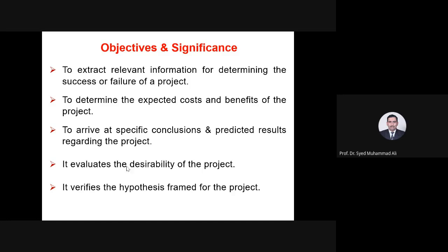Another thing which is being considered now, apart from climate change, is also the physically challenged people, disabled people. Are they being considered inclusive in the development project? That has also become part of the appraisal now. Are the women given emphasis in terms of utilization, for example? Just as an example, there is a road which you are planning between Mardan and Charsada. For example, it takes a 1 hour drive. Are there a reasonable number of restrooms? Are there restrooms available separately for men and women? Just a very simple example. Yes, generally they are like that, but still it has to be checked. It has to be verified.